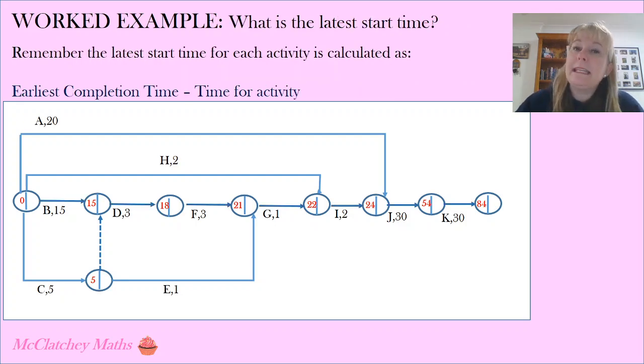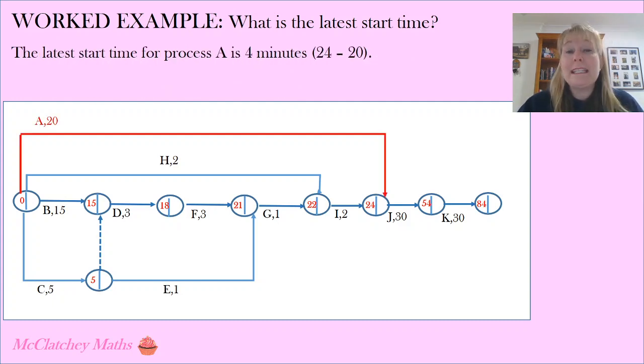Now I'm asked to find the latest start time for each of my different activities. Remember once again these are for activities not on the critical path. And I calculate this as earliest completion time take away the time for the activity. Now remember the earliest completion time is always going to be 84 minutes. We calculated that earlier on in the video. So the latest start time for process A is going to be 4 minutes. 24 take away 20. The latest start time for process C is 10 minutes. 15 take away 5. This is 10 minutes into the overall process. The latest start time for process E is 15 minutes. 21 take away 6. And the latest start time for process H is 20 minutes. 22 take away 2.